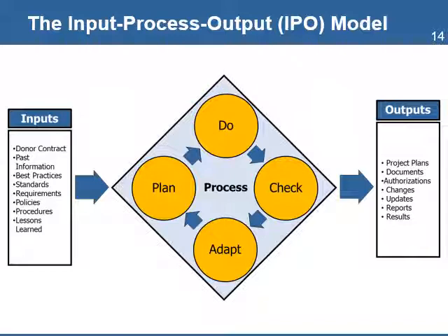But not all processes are the same. Some will require more effort, more inputs, and more time to manage than others. For example, a project that has significant constraints on the budget will require more discipline and more detailed plans to manage the cost of the project.